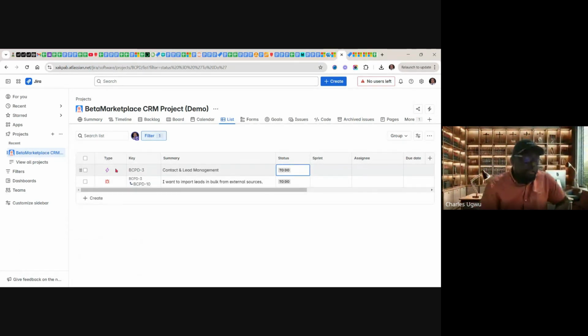At this epic, contact and lead management, all the items under this epic have been completed. But we still have a bug under this, so we cannot say that this is done. This epic is not completed yet until we fix this bug, because this bug is a child of this epic. So that's why we have only